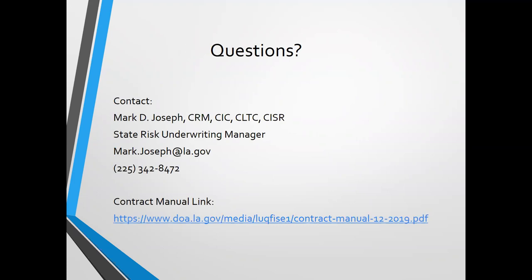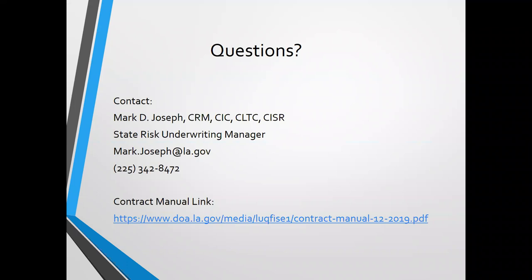I'm going to wrap it up here because I know I'm a little over time. We have some questions: Is flood insurance not included in a builder's risk policy, and how do we determine if it is or isn't included? On a builder's risk certificate, it should specifically identify flood coverage if they've endorsed the policy for flood. They could also provide flood coverage through a separate policy. If the builder's risk doesn't identify flood coverage, go back to the contractor — they need to either get flood endorsed on their builder's risk or provide a separate certificate for the flood policy covering the project.